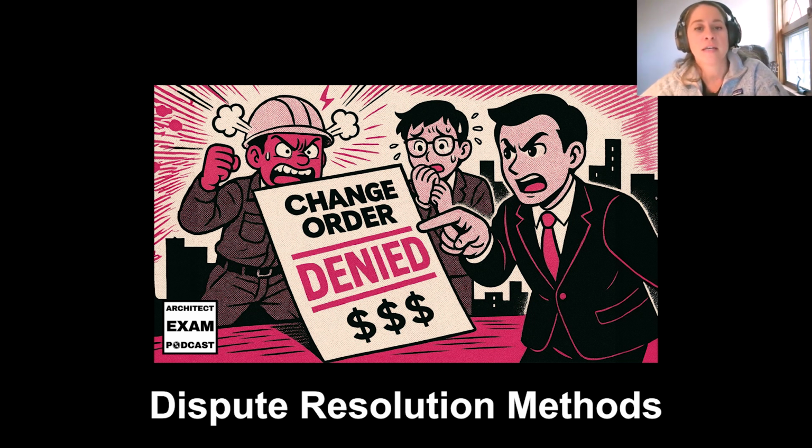So in a dispute review board, the costs are shared between all the parties involved in the project because they knew about it early on. These boards are effective in preventing escalation to arbitration or litigation. Essentially, dispute review boards act as mediators, but they're established early on, usually on larger projects, just to guide any issues that may come up throughout the project before it needs to be escalated to arbitration or litigation.